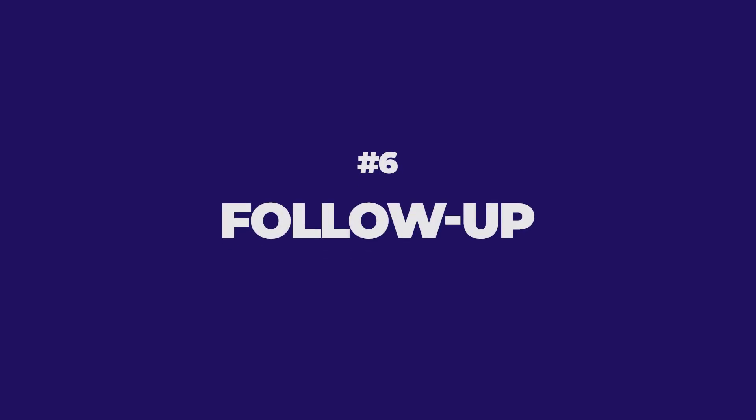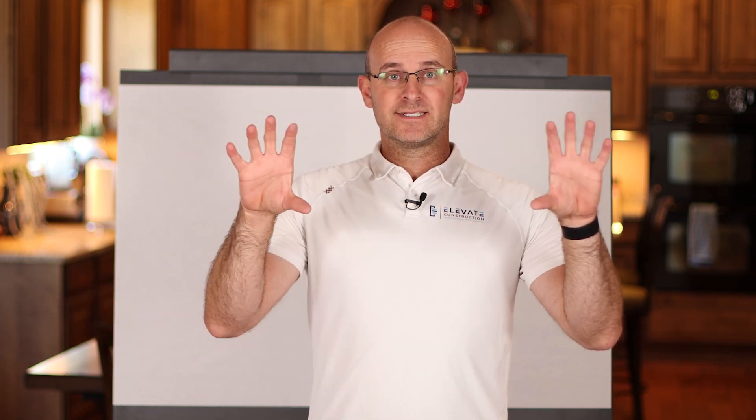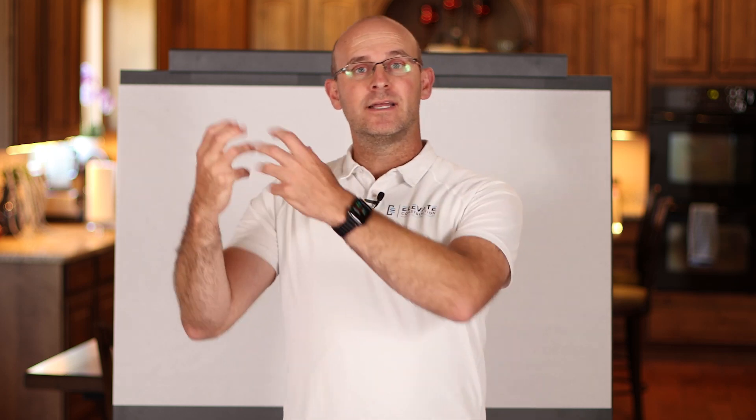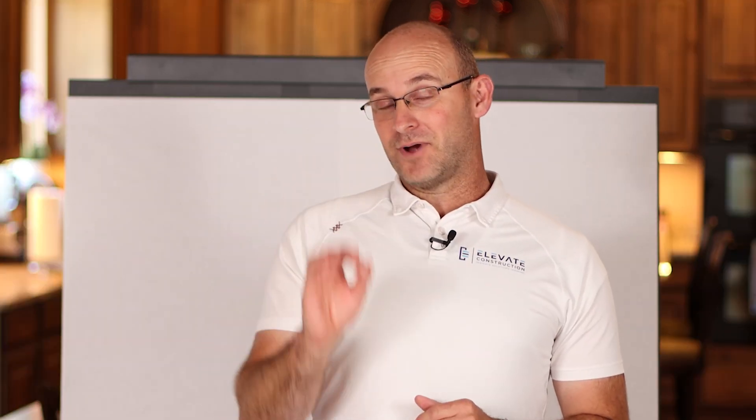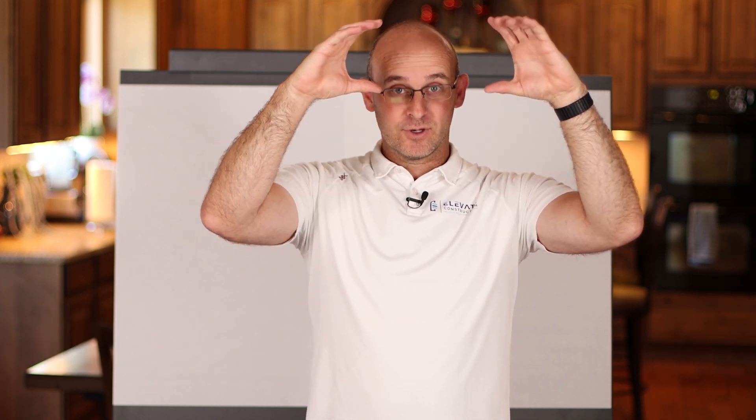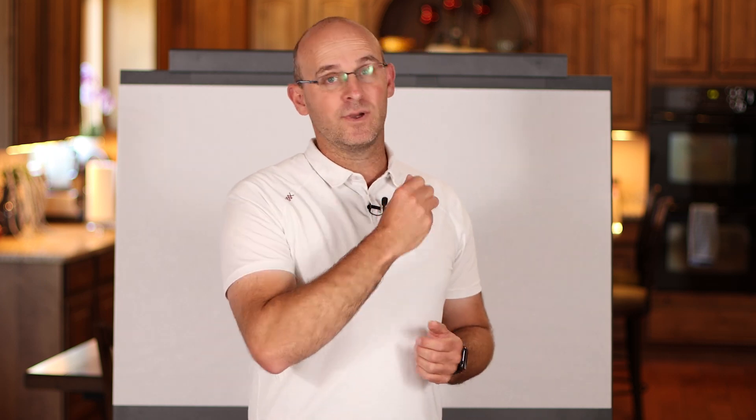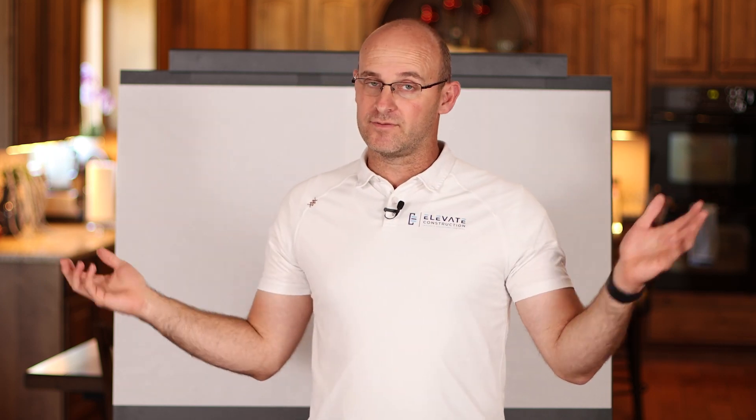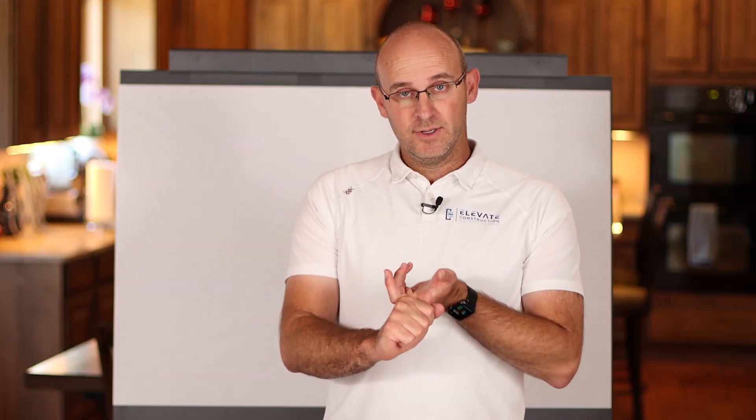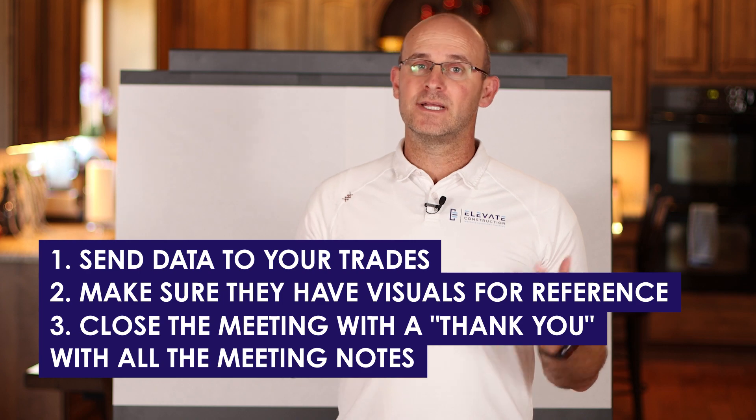Then you do follow up. And so this is covered in other videos on this channel. The pull plan sequence can either remain and the team can use it for the look-aheads and weekly work plans, or it can be looped back into your CPM schedule, which actually I don't recommend. Or the right way to do it is to take that sequence, make sure it's identified by the proper number of zones and that your pull plan is according to the right zone size, and these become your tact sequences in your tact plan. And that is the best way to do it to also maintain flow, not just in one area, but through all of them. So you must do something with this pull plan when it's done. At a minimum, you will send the data to your trades. You will make sure that they have a visual they can reference and you will close the meeting with a thank you with all of the meeting notes and any decisions made.